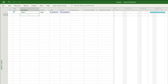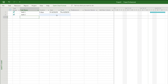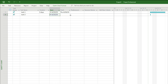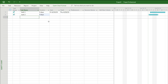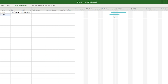You can continue adding more tasks the same way. Alternatively, you can give your task a start and finish date and the duration column will be filled automatically. If you give your task a duration but do not specify a start or end date, a taskbar is created beginning at the start date of your project, with blurred edges to let you know that no start or finish date has been set. If you need to reschedule a task, you can adjust the start and end dates in the task list or simply click and drag the taskbar. You can also change the duration by clicking and dragging the end of the taskbar.